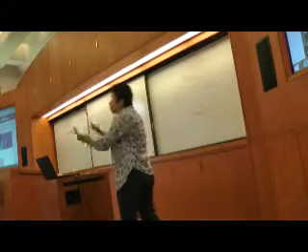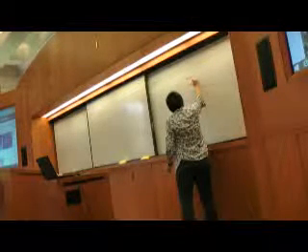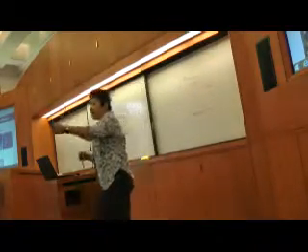Don't be, because this just shows you the practitioner world is very imperfect. In the best case scenario, you would do your planning, you would do a needs assessment, and as you do it, you might come up with a simple baseline. I'm guessing that if I wanted to do access to information, here are some of the typical indicators. Since I'm already asking people questions, I'm going to build in 6 questions that would give me some kind of a baseline.